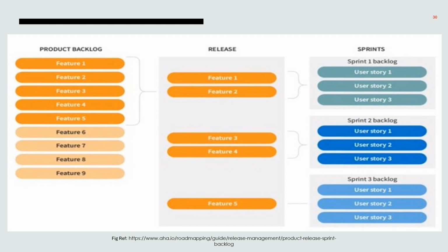A maximum point of time capacity is set for each release. The release date and the number of features included in a release backlog are determined by past velocity and resources available. It is also owned by the product manager. So both the product backlog and the release backlog are owned by the product manager only.